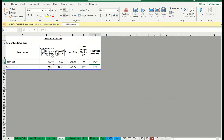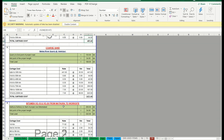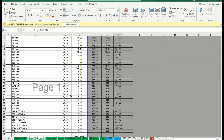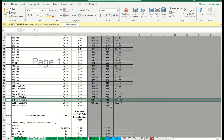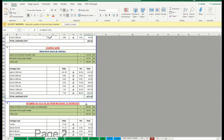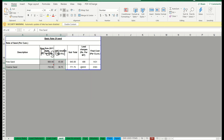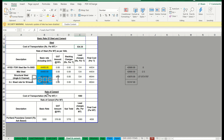Similarly for coarse sand: start with the normal basic rate, add GST, then add lead charges of 1622 rupees. This is because the lead distance is very high at 189 kilometers. From the lead statement for 189 kilometers we get 1621 rupees. So the coarse sand final rate is calculated the same way. That completes the sand calculations.